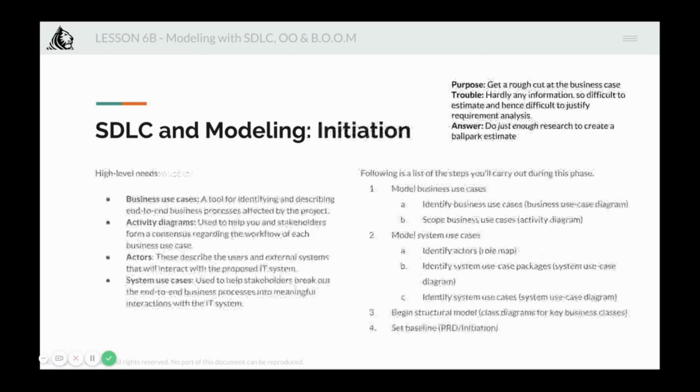In a lot of agile setups, you don't have to baseline because everybody knows and believes that the requirements are going to consistently change. So we should not be baselining anything. But then again, I believe that for anything larger than a month or two, the PRD should be baselined on a sprint to sprint scale, because it's very easy to get into a spiral loop where